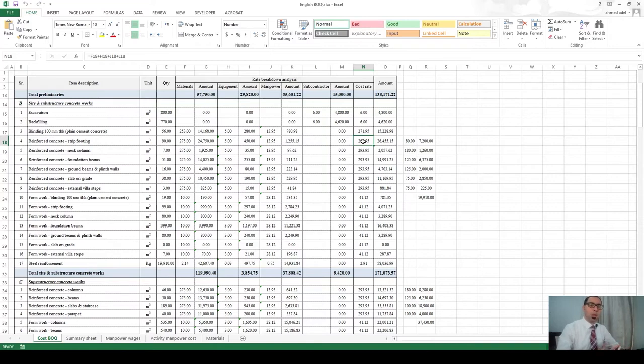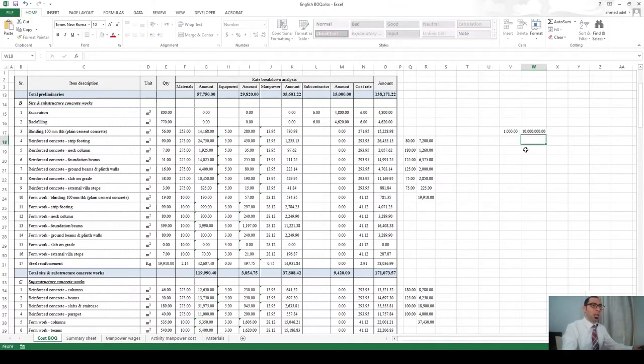For example, there is a method called the end unit method. And what does that mean? For example, if I executed a hotel that has 1,000 rooms at the cost of 100 million, let's say. So now a hotel that had 1,000 rooms cost 100 million. So how much is the cost per one room? This divided by this, the room will be about 100,000.